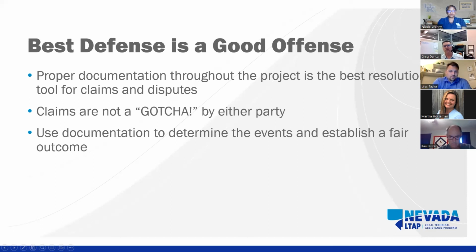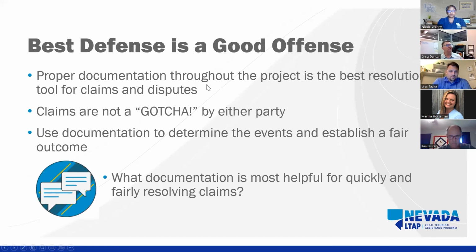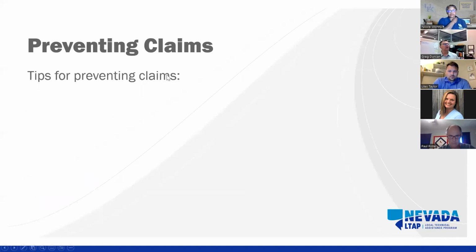Often a contractor is due additional funding. And the question here is, what documentation is most helpful for quickly and fairly resolving claims? I would say the project diary, field book, that documentation that we've kept.